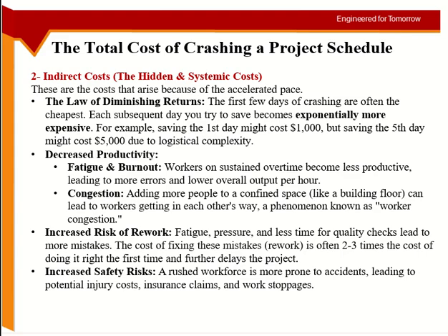And this usually happens because of the indirect costs. Because I already gave you the example. You are doing the work at night, so you may be calculating that I will pay my labor for 2 hours extra, and you are only calculating that, but actually you are paying more for electricity and water than what you are giving for the labor. Okay, so the indirect cost plays a big part in the law of diminishing returns. Okay, so I hope you have got the point.